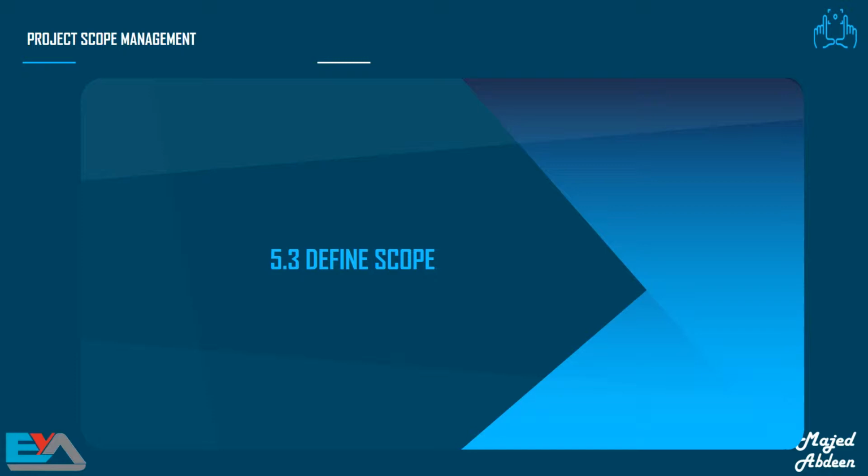We need this in the project environment, because if we understand what we need to do, we can plan most of the work in advance, and if we don't understand the work that needs to be done, it leads to changes to resources, schedule, and cost. Just assigning a project manager isn't enough to get the scope under control. That's why you need the define scope process.